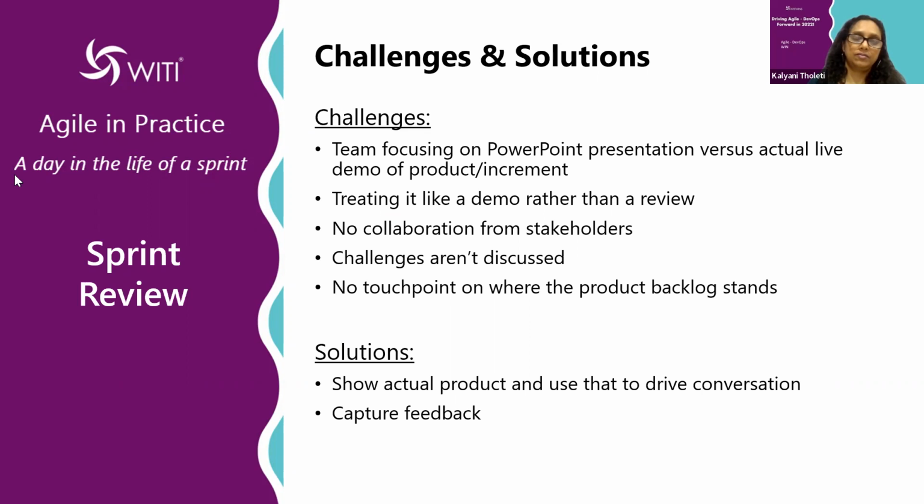It's not tossing it over the wall and saying, hey QA, that's your problem now, you test in the test environment. Along the way, as stories get completed, they get a mini demo with the product owner and the development tester, to make sure it meets the acceptance criteria of the user story. So by the time you get to the sprint review demo at the end, you're 99%, almost 100% confident that whatever you're going to demonstrate meets the product owner's acceptance,